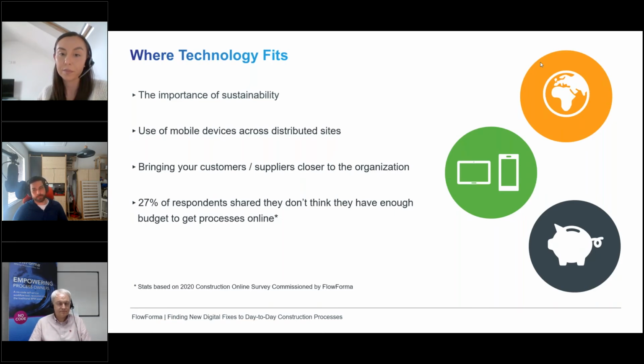So there is new legislation which is coming in, which I think is a building safety bill, which is sort of like a follow-on, or sorry, a response to the Grenfell incident that happened back in 2017, and it's focused around high-rise residential buildings and traceability of information through design, construction, installation, and then handover. And effectively, what will be required is a fully traceable set of information all the way back through the process to make sure that the thing has been designed correctly, the product that's been chosen is the correct one that meets the criteria, and then effectively also includes installation side of things.